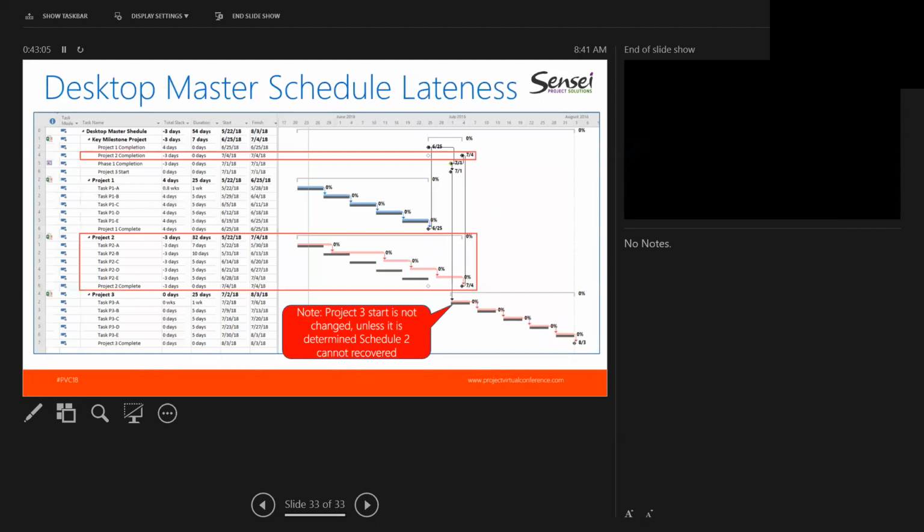Okay. I'm going to open up our key milestone project. And I'm going to check it out. And right now you can see I have my phase 1 completion, and I don't have my project 3 start date set up after it. So 2 things I'm going to do is I'm going to go ahead and put my project 3 start date. It's going to be a milestone, and it's going to be connected finish start. I select the first task, I select my second task. I can then go to the task, and I can use my link to create my finish to start relationship between the project 1 and the project 3 start milestone in my plan.